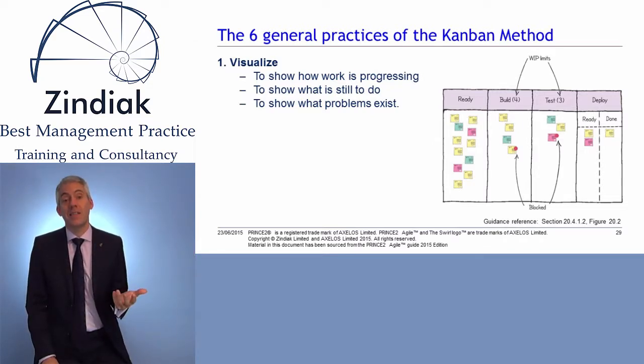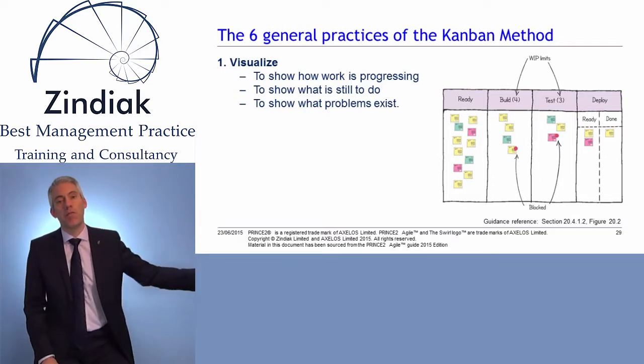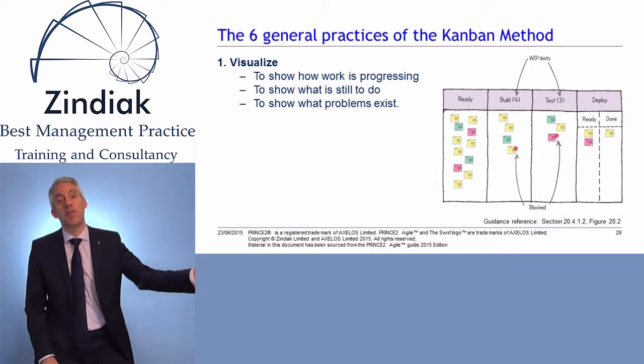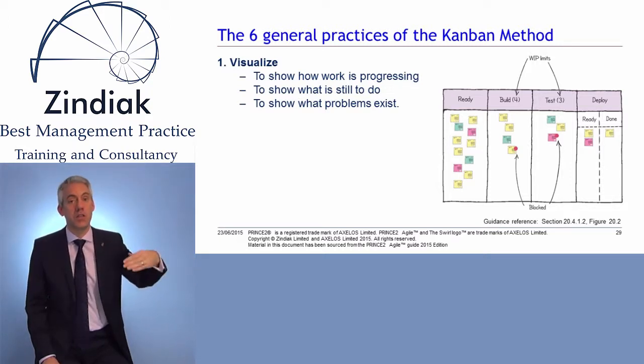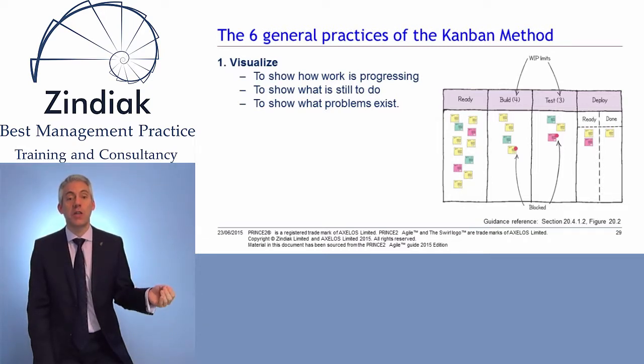On an IT type project, you might want to break it down by hardware, infrastructure, software, networks, or by different areas of application. If you were developing, say, an ERP system, you might have a swim lane for finance, a swim lane for operations and a swim lane for HR. One word of warning, you don't want to overcomplicate it, because then you lose its power, which is to be able to look at it and get a very quick overview of the current situation of the project.